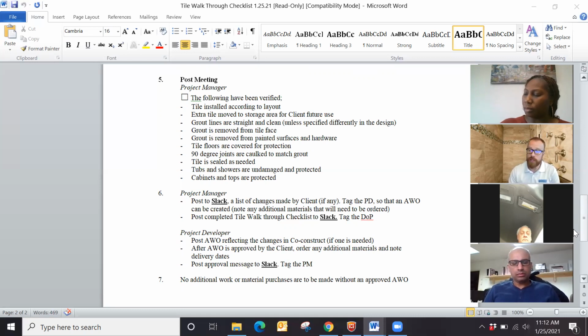Some of those items we like to determine, obviously, without the client being present, so we can make the best determination and present that solution to the client. But we ultimately don't want the tile installer to make that assumption. We want the tile installer to identify any issues, and then you as a project manager can make a decision on the best course of action. Yeah.